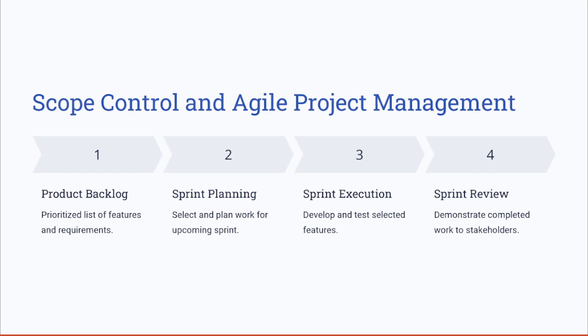So again, when we talked about scope control in Agile project management, we said that Agile projects have flexibility in scope through conducting iterations or sprints. Scope control is achieved using a backlog, product backlog refinement, and sprint planning, and any changes are managed through prioritization techniques. No formal change control boards are required when handling an Agile project.